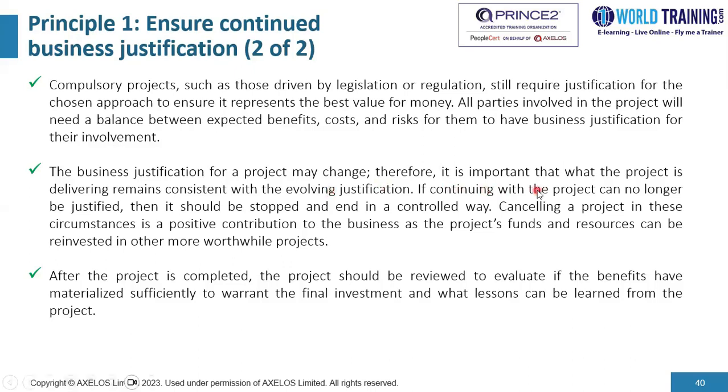If continuing with the project can no longer be justified, then it should be stopped and end in a controlled manner. Canceling a project in these circumstances is a positive contribution to the business, as the project's funds and resources can be reinvested in other more worthwhile projects.